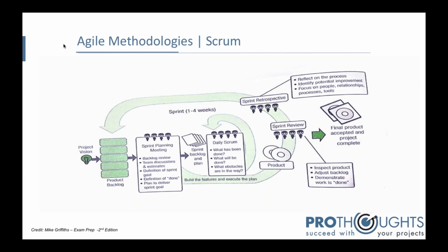Okay, so a complete release can be made up of 10 different sprints, for example. So after every sprint, there is a review, there is a retrospective, so that things can be improved as you go ahead. So this is one method of Scrum, the most popular method.